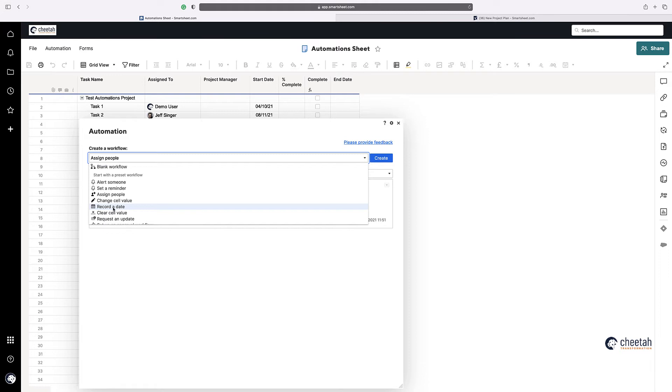So for example, I can set up an automation to say, if this becomes a date, then tick this box. So I can say, if this is a date, then make this one, which will then tick that box. I can automate that process as well. In regards to record a date, depending on your sheet you're using, you can actually record a date for many tasks. So if there's a specific task within here, or if there is some other item that you want to record, that a date is finished for invoicing, for example. If your project is based on different phases, at the end of phase one, you need to not invoice, but at the end of phase two, you do need to invoice. Phase three, you need to invoice. Phase four, you need to invoice, but phase five, you don't. Then obviously for the phases two, three, and four, you can actually record a date of when that was completed.